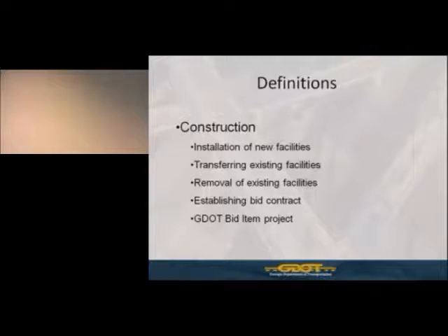in the department's project. One thing I want to point out here on removal of existing facilities: please, as a utility owner, do not forget to account for removal of your existing facilities. If you're abandoning facilities, particularly above ground facilities such as a pole, so forth, that will require removal before the project's complete, make sure you account for that time within your schedule.